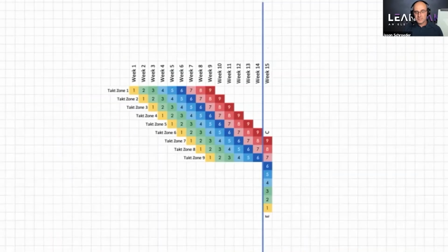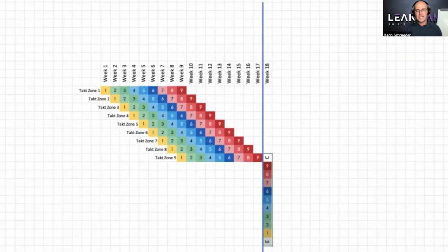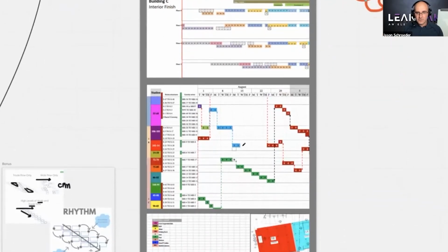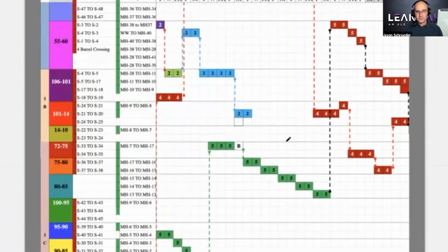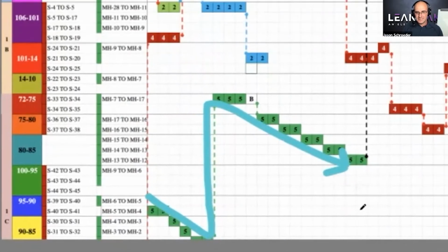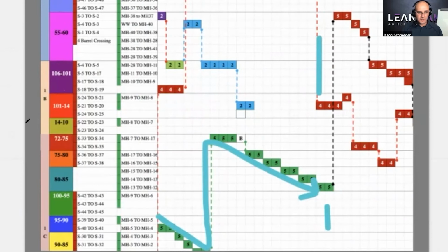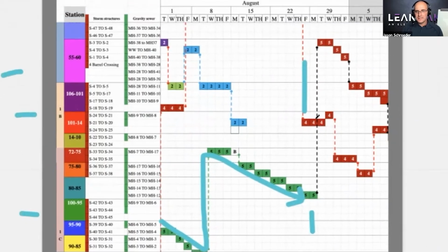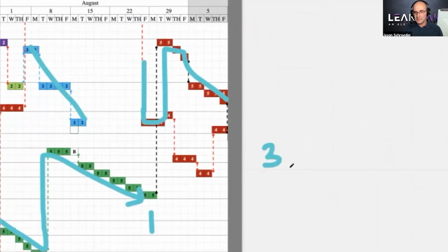Once we understand this, it opens up the world. It opens up all of these other formats, and it opens up all of these different ways of looking at takt planning. So again, why does a civil project look different than a normal takt plan? Because this right here, this storm sewer, is a single train, and it's broken up by area, right? The most important part of takt planning. And this storm drain it's a separate train. The water line is a separate train. So this is a 3-train takt plan.